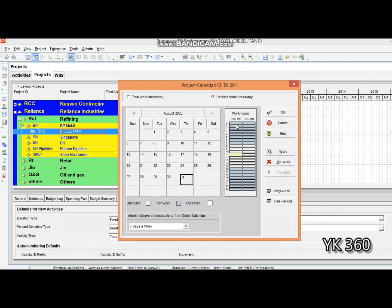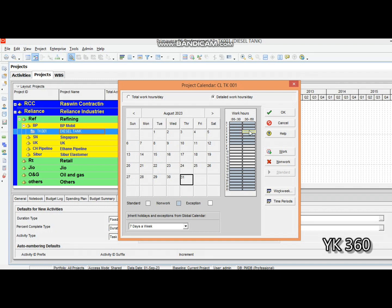You can see there are two boxes here - each box is half an hour. For example, this is 2 to 2:30 and this is 2:30 to 3 o'clock. If you double-click any box it will become working hours, and if you need to make it non-working, just double-click again. Before we start, we need to do this for every day, so you need to go to Work Week.